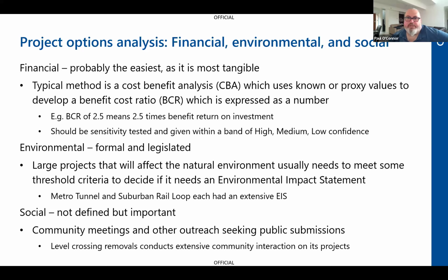And then what you might do is start attributing values to each one of those types of vehicle. And you would attribute a value in terms of the time savings for that particular class of vehicle if they were able to travel at a faster speed.